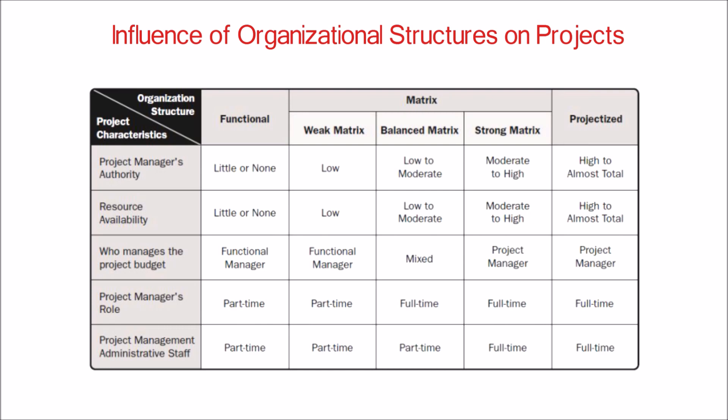The project manager's role is part time in functional and weak matrix organizations, but it is full time in mixed, strong matrix, and projectized organizations.